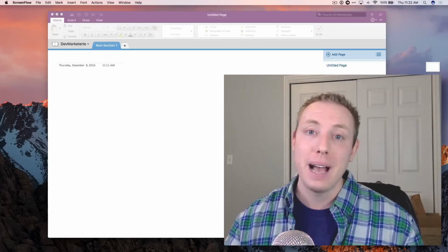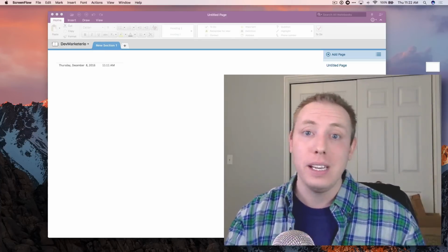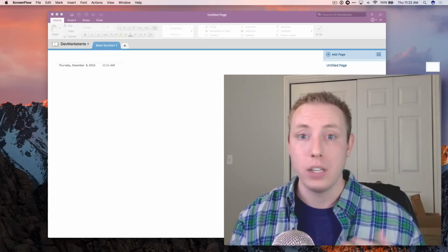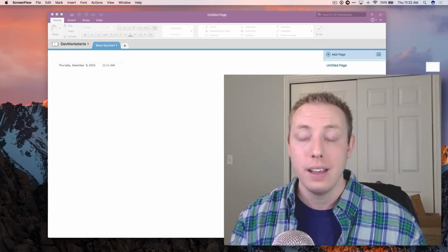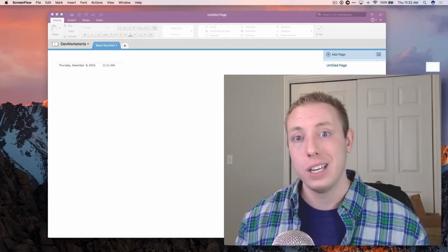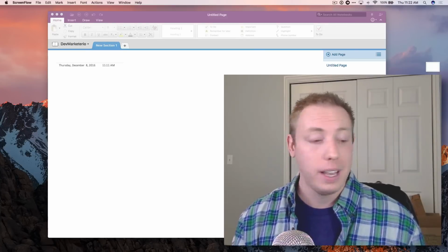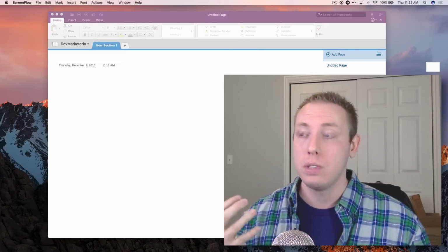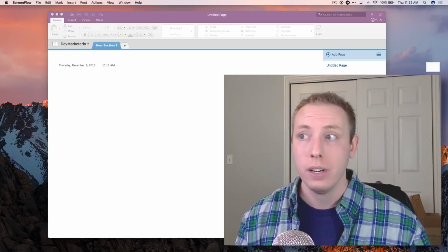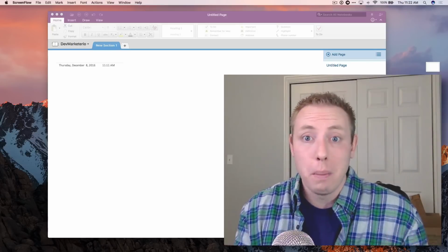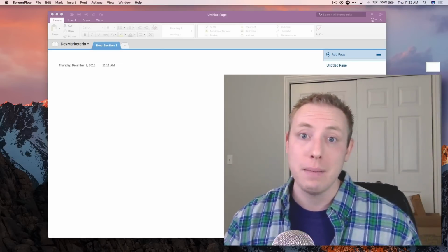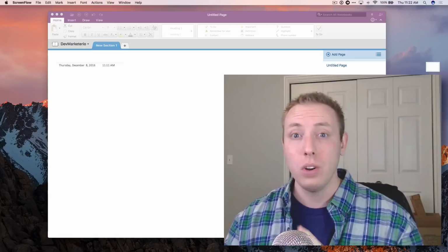Or the client will come back to you and say, oh, well, we decided we need all these other features. Can you go ahead and bake those in? And then you're stuck with the awkward conversation of saying, well, I've got to go back and redo all this work. It messes up all the designs. It messes up some of the code base, the database structure. It's going to cost more money because of all this additional time I didn't account for. And it's just something you don't want to have to deal with.